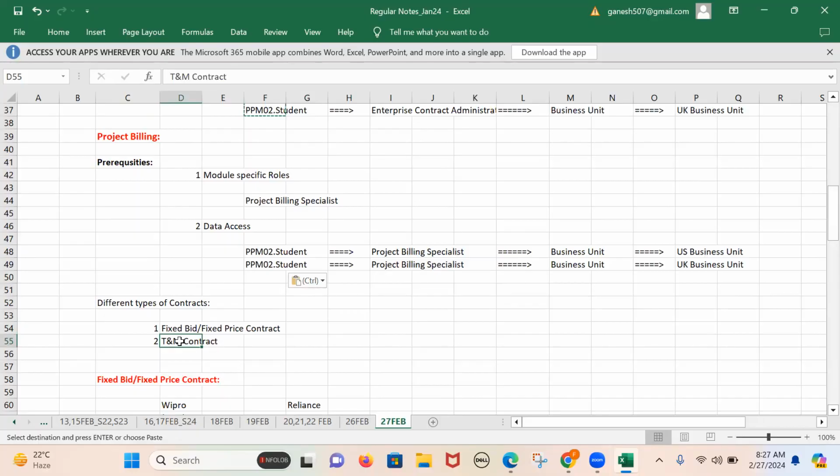The customer doesn't care how many resources Wipro is going to allocate. The customer is paying 2 crore rupees, which Wipro is expecting. Okay, the lump sum amount, both have to agree to start a project, which is nothing but a fixed bid project.